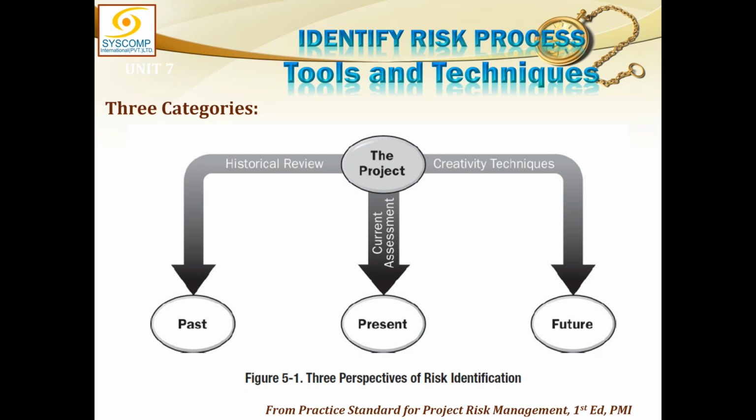Then, from the present, I could base my identification of risk on some current assessment, some analysis, some calculation, some mathematics, some probability. So I may identify certain risks. So this is based on the present category. And from the future, that is something which I don't know and which I presume may happen. This can only be explored through creativity techniques. What if this happens? What will we do? What if that happens? What will we do? So that is exploring the future.